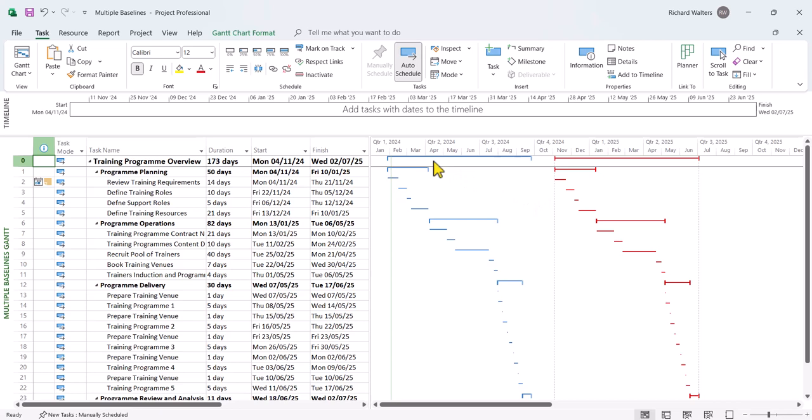So I can now see my two baselines. The blue baseline is my original baseline. The red baseline is my second baseline. So I can now see how the two baselines are. And if anyone asks me questions, I could see whether the blue baseline had to be reset. And the second baseline had to come in due to multiple staff absenteeism. And I've got a note for that. So this is how you could manage multiple baselines if needed. But this kind of information should only be used if you've got a, if there's something that's gone wrong badly with the existing baseline, it can no longer be measured because of some big, big delay or big difference in cost. And then you would set a new baseline as has been demonstrated with a new measure.